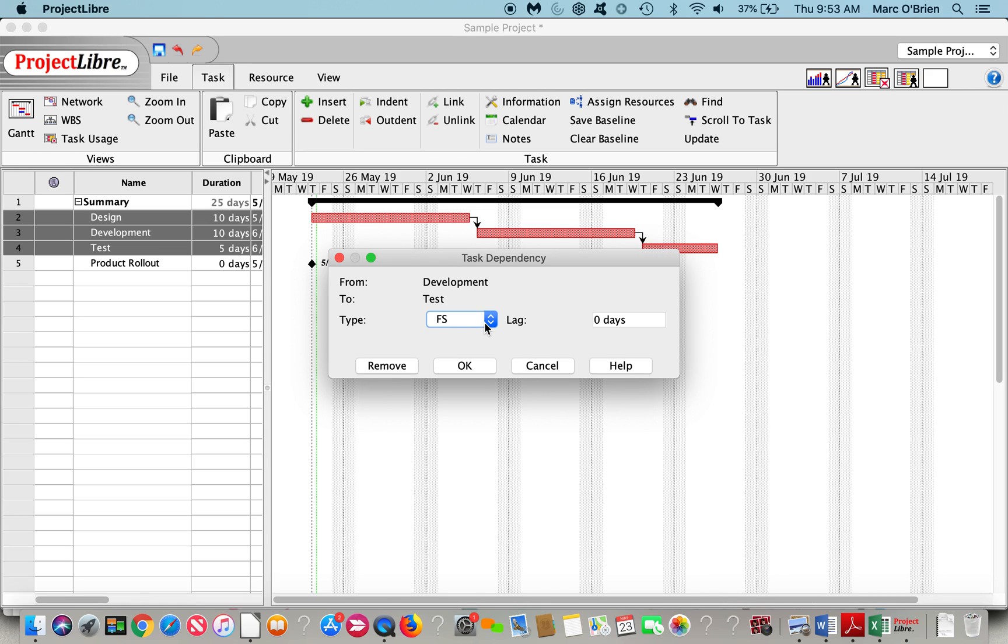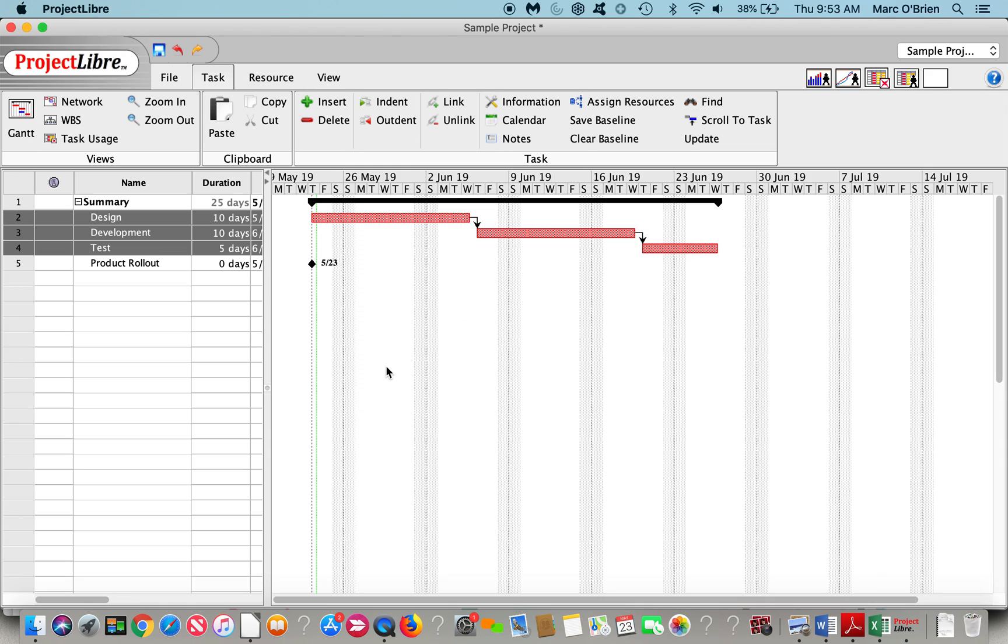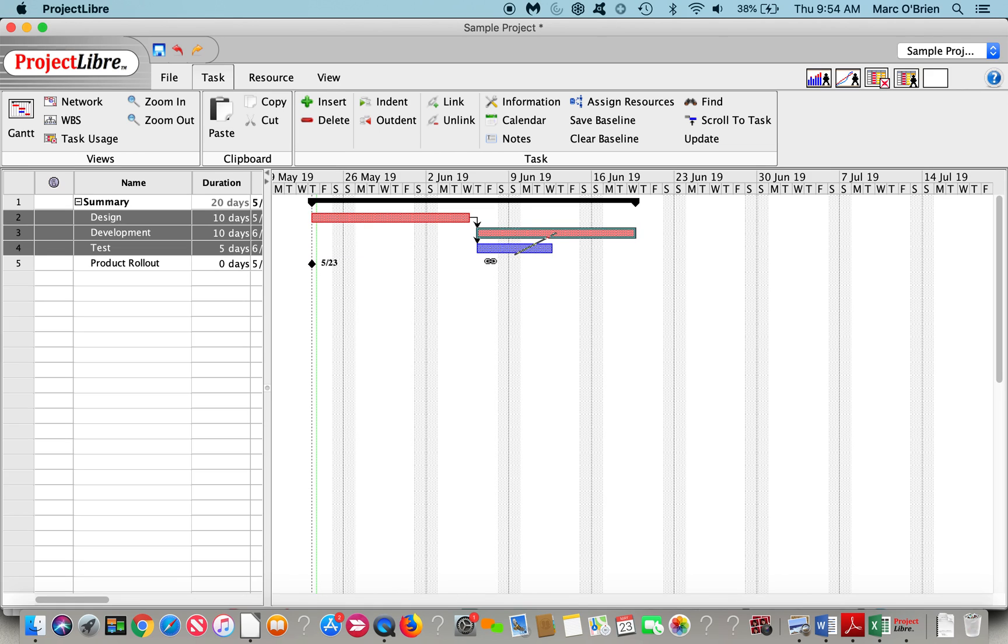These are all finished to start. So the subsequent task will start when the previous one finishes. However, you can model it with finish to finish, start to finish, or start to start. Something starts two days after the previous one finishes. I'm going to remove this link. I can also put the cursor in a bar and drag to the other bar and create that link.